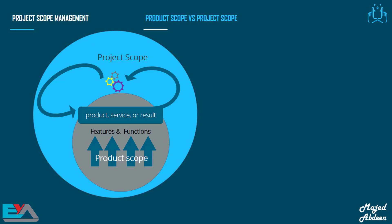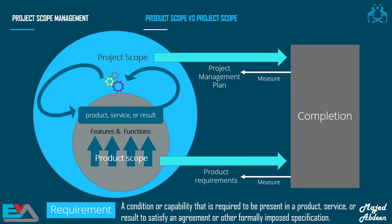Remember, when we talk about scoping out a project, we mean figuring out all the work that needs to be done to make the product. As a Project Manager, this is a big part of what you have to be concerned with — the actual work that the team has to do. Another difference is that we measure completion of the Project Scope against the Project Management Plan, but the completion of the Product Scope is measured against the Product Requirements. Product Requirements includes things like software, technical attributes, security, user documentation, training, performance requirements, etc.